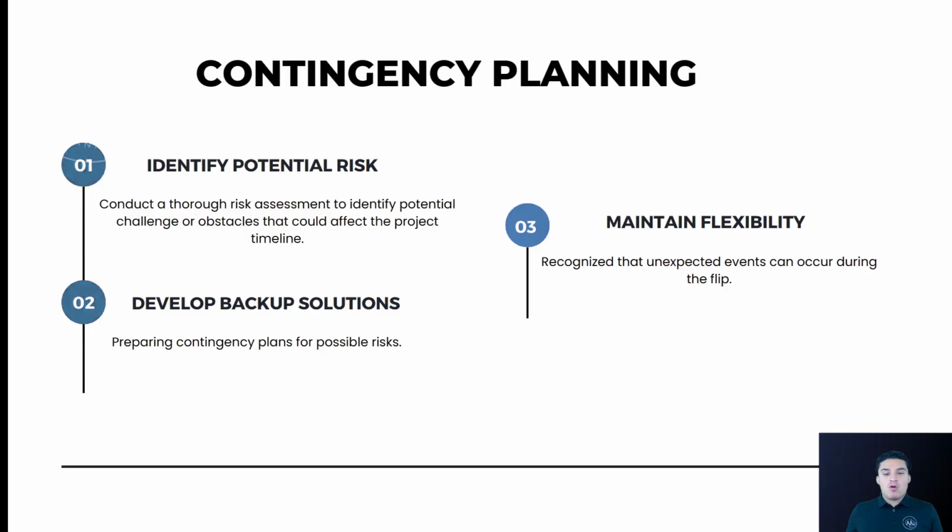Maintain flexibility. Always be open and recognize that anything can happen in every single one of these flips, okay? Which is why you have to become very good at calculating the risk. If you do every property at $40, $50 a square foot on a full rehab and you take accountability for that, that means that you may be prepared for anything that may happen. Because say the property is going to cost, for example, $50,000 more than what you estimated, but in reality it took $30,000.